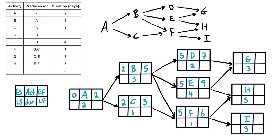For the early start of G, there are two predecessors, so we take the larger value: seven or nine — we take nine. For activity H, we also have two predecessors; nine or six — we bring in the larger nine. For activity I, there's only one predecessor, F, so we bring in six. Then: six plus three is nine for I, nine plus five is fourteen for H, and nine plus three is twelve for G.